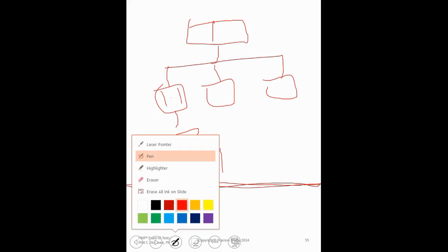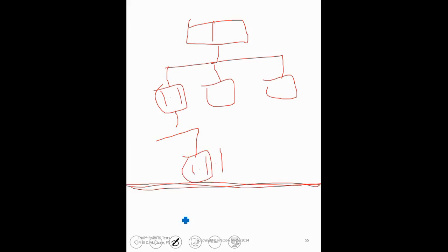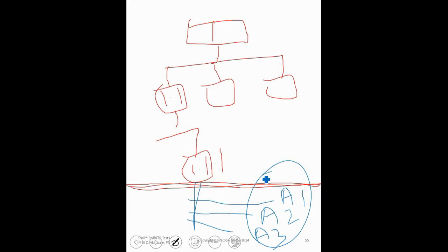Now I'm going to use blue to show you where define activity starts. Define activity starts when you take 1.1.1 and you then break it down further into activities. For example, let's say this is activity A1, this is activity A2, this is activity A3. These are not work breakdown structure components. Instead, they are tasks or activities that roll up under 1.1.1, which is part of the WBS. See?